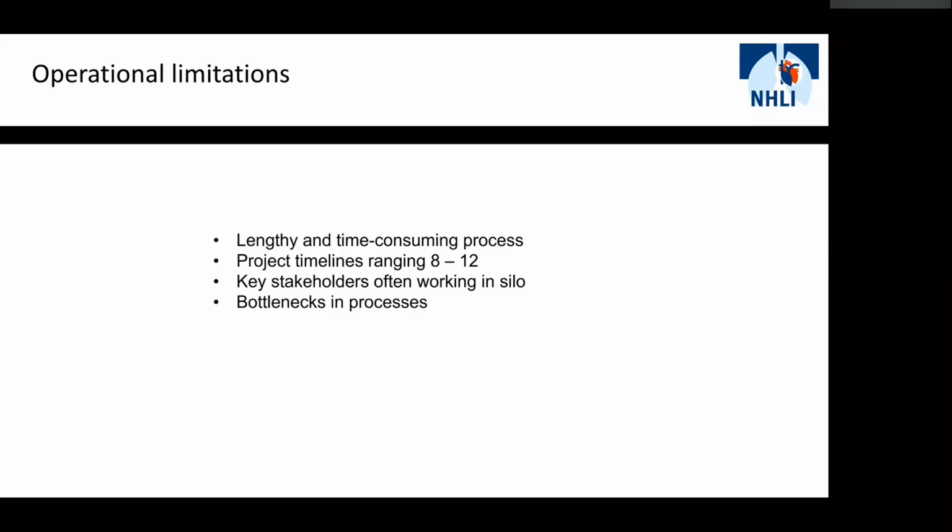And then we often find bottlenecks in processes. So for example, if you have a single e-learning technologist on a project team and they're responsible for, let's say, tools such as Articulate Storyline, for example, they'll be the only one within that team with access to and working on a specialist design tool like that. So then you've actually created a bottleneck where everything has to go through that step in the process, and it can be quite limiting in terms of achievements, especially when you're working towards tight timescales.